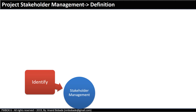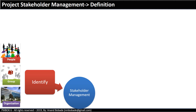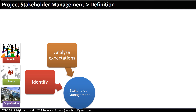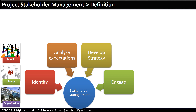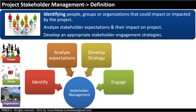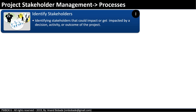Let's look at the project stakeholder management knowledge area definition. This knowledge area deals with identifying people, groups, or organizations that could impact or be impacted by the project. It involves analyzing stakeholder expectations and their impact on the project, and developing appropriate stakeholder engagement strategies so that you can engage stakeholders effectively throughout the project. The first process is Identify Stakeholders, which is part of the initiating process group. This is the process of identifying stakeholders that could impact or get impacted by a decision, activity, or outcome of the project.